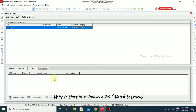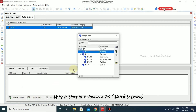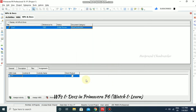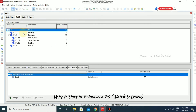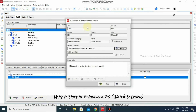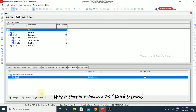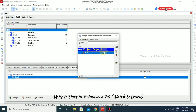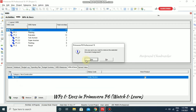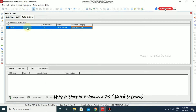Under Assignments, you can assign to an Activity or to a WBS element. I am going to assign it to WBS — select the project and assign it. You can then see the assignment appearing automatically. Go to Details to view the details, and you can also launch the document from there. If you want to remove an assignment, you can do that as well.